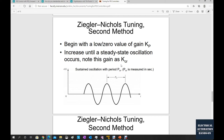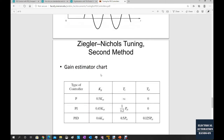According to this manual, the second method works as follows: we begin with a lower or zero value of the gain, then increase the PID gain parameter gradually until the system gets oscillation. At that moment, we need to measure the period PCR — the time between two peaks — and record this PCR value in seconds. Other than this, we also need to record the gain value at that moment, which is KCR. Then we follow this chart and equations to calculate the gain, integral, and derivative parameters.